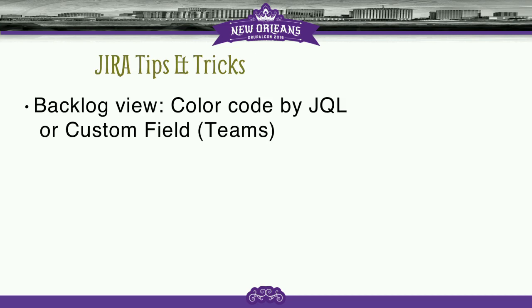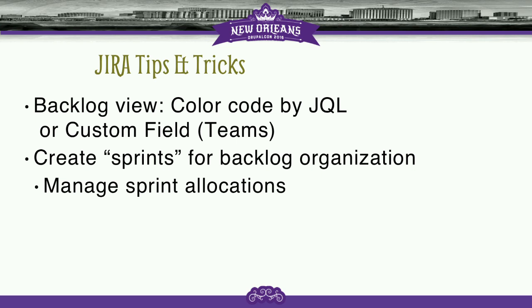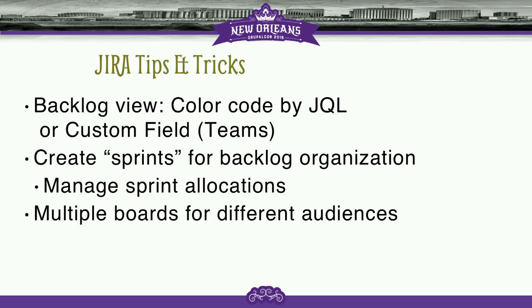All right, this is the fun one. I'm going to do this really quick. If you're not doing it already, use color coding in the backlog and create sprints in your backlog. What this allows you to do is see everything much more easily. If you have an open sprint, make other sprints for future sprints for planning. You're in sprint one, create another sprint two, and start putting tickets into it. In developer parlance, it would be like your fixed version, which you can assign separately, but from a sprint backlog perspective, now you can see how many points you have assigned for effort in those future sprints